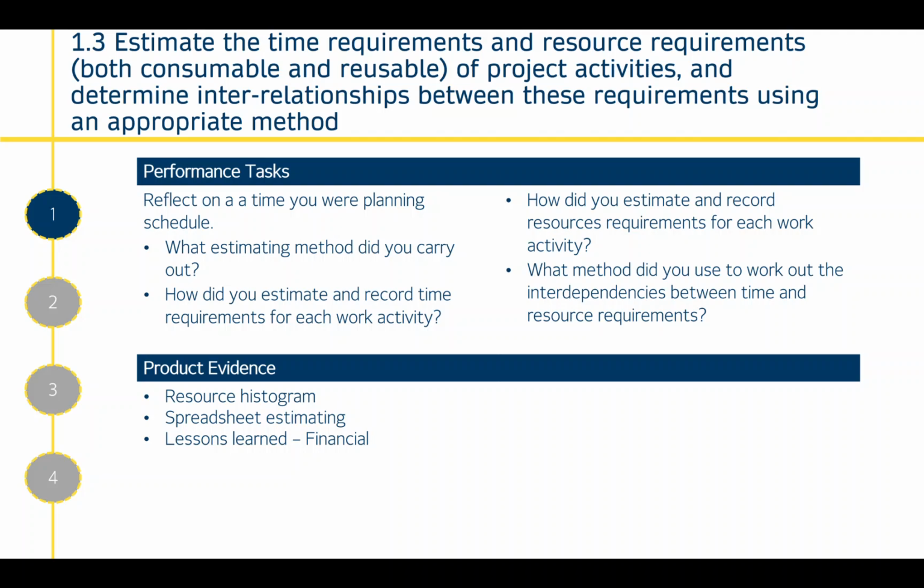It could be a spreadsheet of your estimating, doing calculations to estimate. Could be using your project management software if there's a tool on there that you would use to estimate time requirements. You can also look at your information management strategy or your knowledge database for your organisation to look at previous projects which have occurred, and maybe you would identify one of your estimate methods would be to look at similar previous projects and maybe make a change for accounting inflation, or if your project's more or less complicated, making adjustments to it.